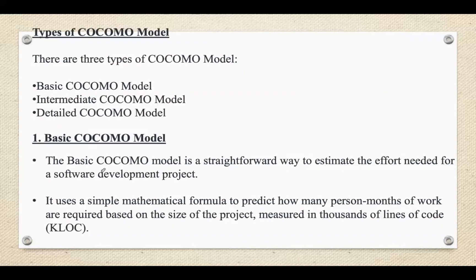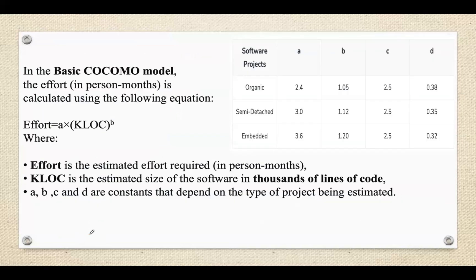Types of COCOMO model include three categories: Basic COCOMO, Intermediate COCOMO, and Detailed COCOMO. Basic COCOMO is a very simple version used to estimate the effort in person-months and the time required to complete a software project. It provides an initial estimate based primarily on the size of the software system measured in KLOC and the type of project being developed — organic, semi-detached, or embedded. Key features: input includes the estimated size of the software in KLOC and the type of project; output includes effort in person-months and time required to complete the project.